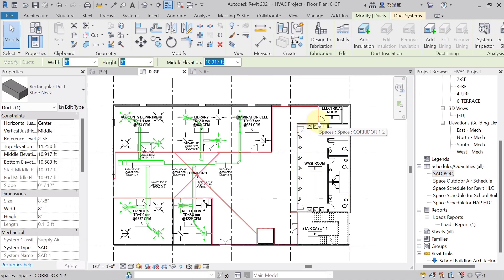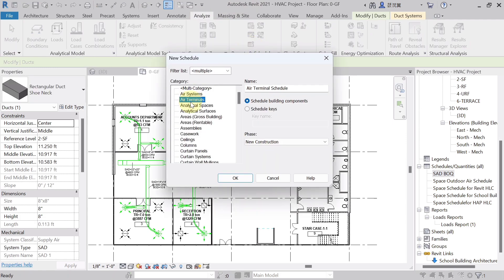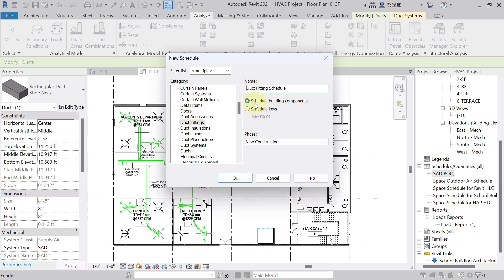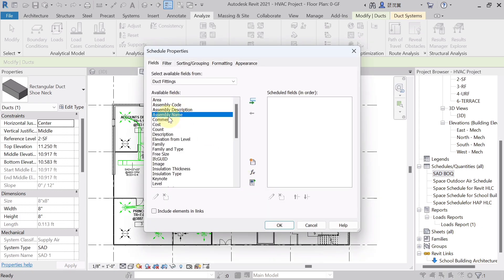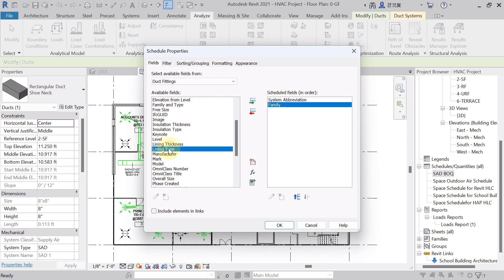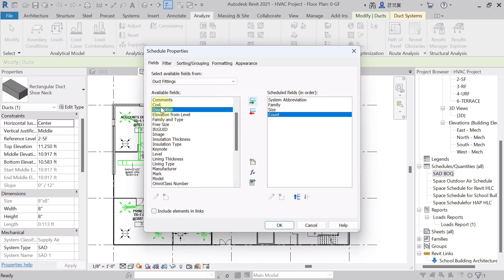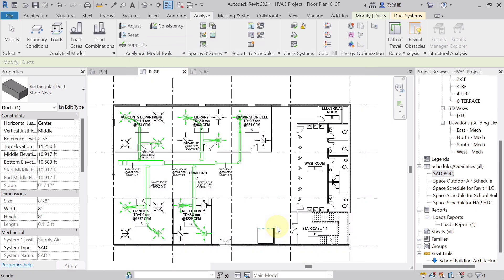Now to create a schedule for duct fittings — elbows and other fittings — go to Analyze tab, Report and Schedule, and hit Schedule or Quantity. From the category, select Duct Fitting. Name it 'Supply Air Duct Fitting Schedule SAD BOQ', then hit OK. Add fields: System Abbreviation, Family, Size, Count, and Cost.